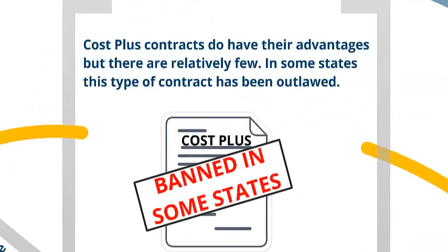Something to be aware of is that cost-plus contracts are actually not endorsed in some states. Now what this means is that the regulatory authority won't support you in any type of contract dispute.